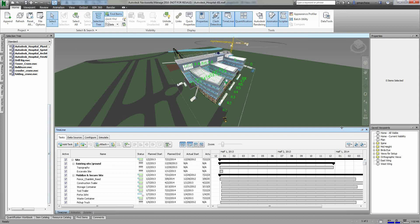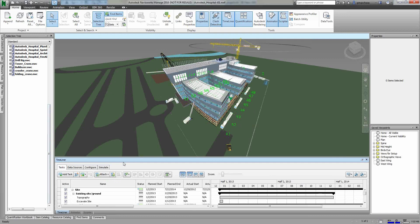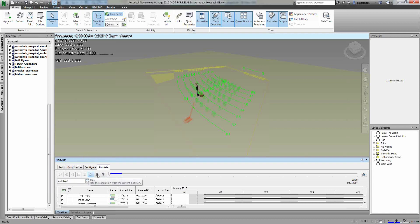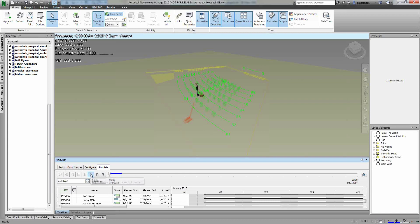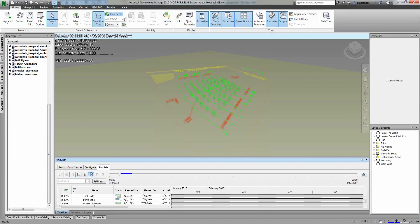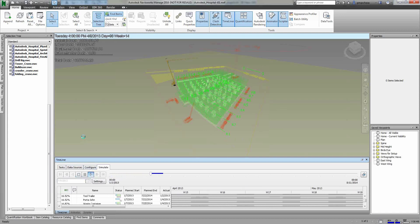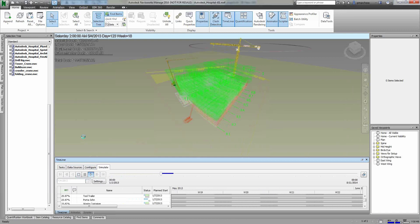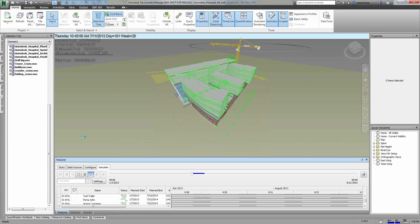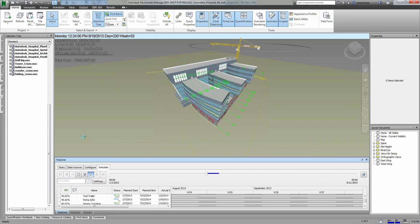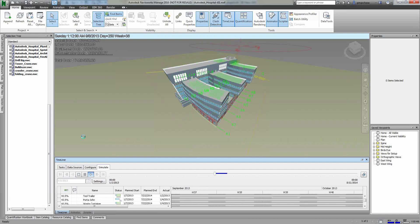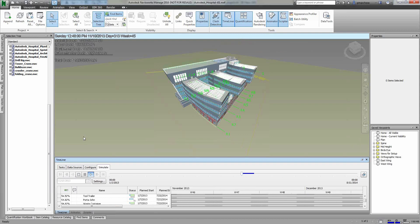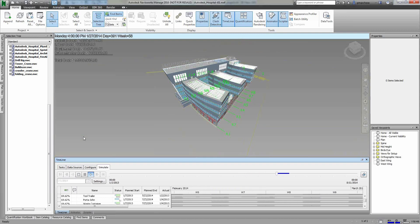What this actually allows me to do is to set up this view for simulation. When I click on the simulate tool, I have my VCR controls or DVD controls. On the upper left-hand corner of the view, I have the date. I actually have some cost information. I'm just going to hit play and let this run. Now, what's going to happen is based on the color, I'm able to tell what's actually happening. I can see things in green - those are the things that are actually being built or constructed. I can see some things in red for demo, some things in yellow for temporary. I can actually watch the building go through its phase, see what day I'm looking at, what time I'm looking at.